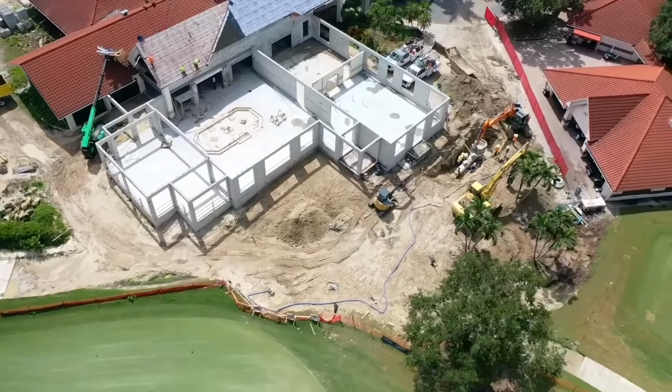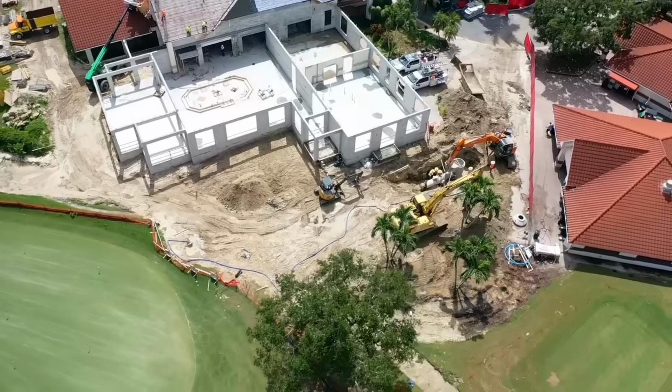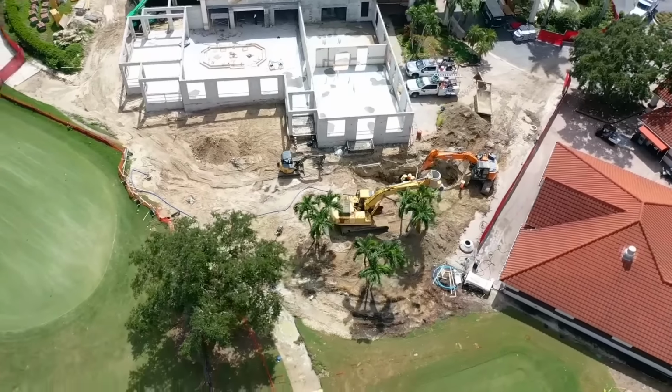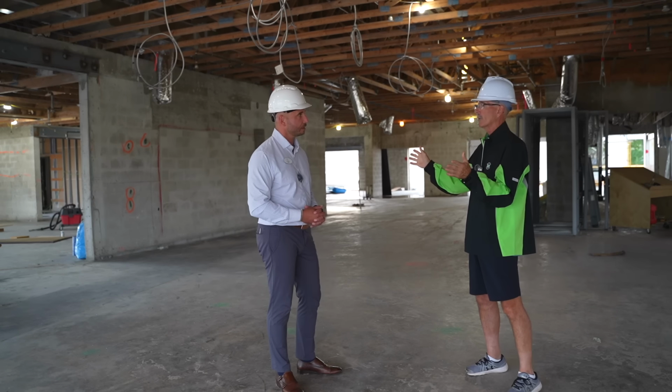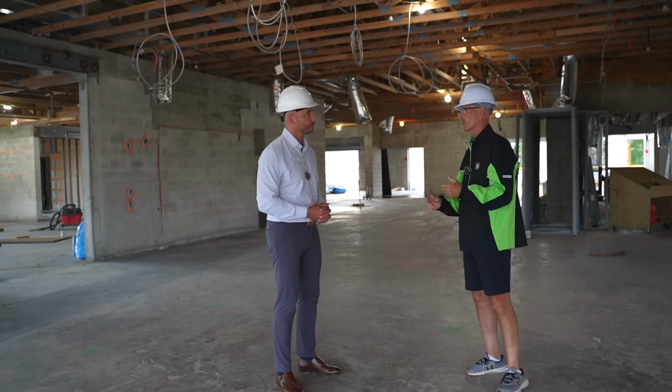So, a lot of concrete work last week also? Yes, we have all the interior slabs that were cut and trenched for piping. All has been patched. We're standing in the dining room right now. We've got patches in front of us, patches to our right. All the kitchen areas have been re-poured. Remember, we took the entire slab out of the old kitchen because there's so much piping and electrical work underground, and drains and so forth. So all of that kitchen is finished, all patched up.